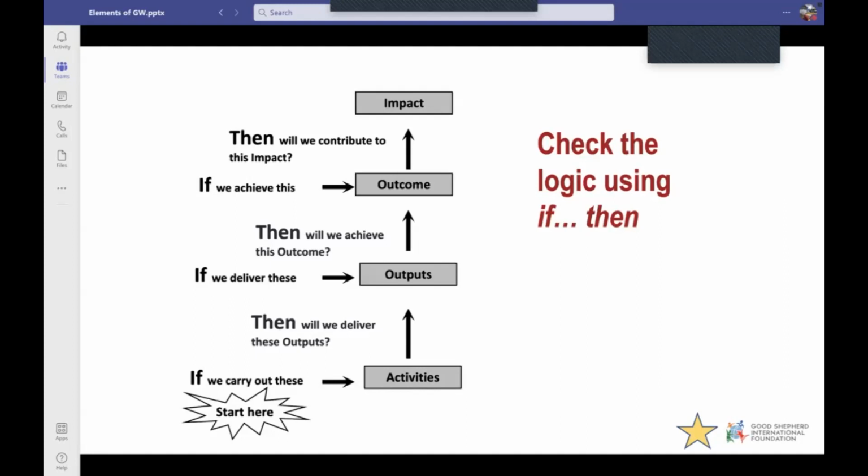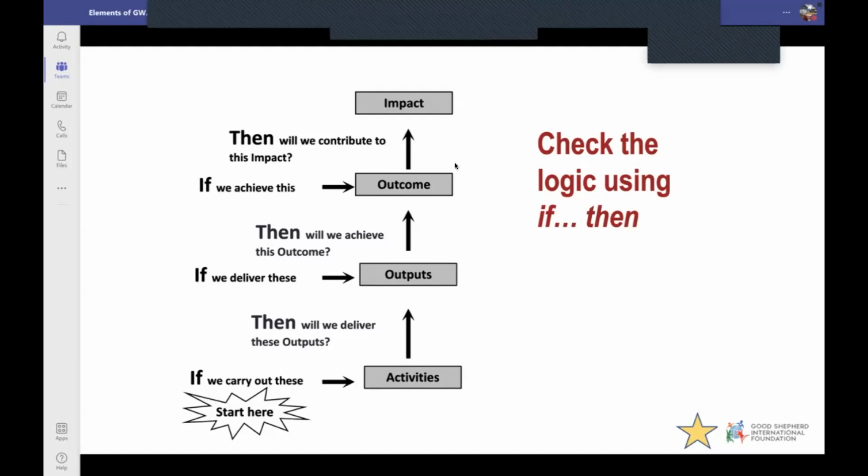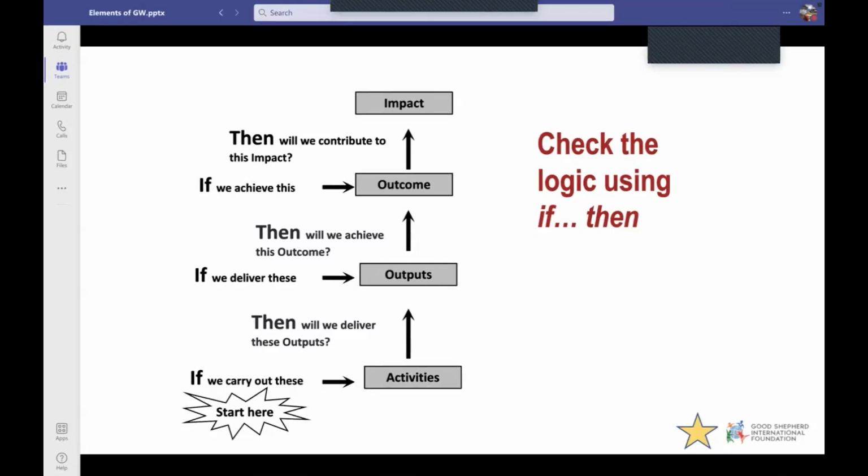Because if you look at the money that you have and then you shape the activities, you may find that the money is not enough to get to where you want to be, the impact. And so when you actually do the overall framework and conceptualize the overall project, then you can say, I need 500,000 to get this whole thing done. I need to have 6 donor agencies because one donor agency will not give us 500,000. So there are 6 places that I need to go and look for money.